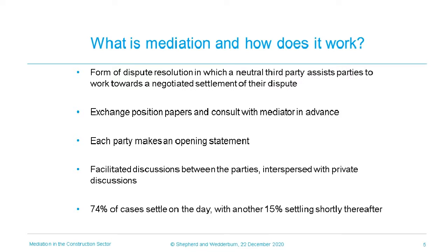The mediator will formally open the mediation with a plenary session, providing an overview of the procedure before allowing each party to make an opening statement to outline any points of particular concern. The mediator will then facilitate a discussion, either in a joint forum or separately, as well as holding private discussions with each party to understand their position and possible compromises. The overall target is to reach a settlement between the parties.